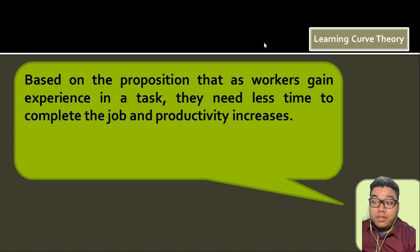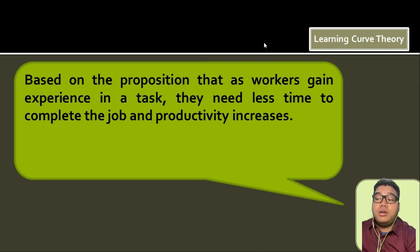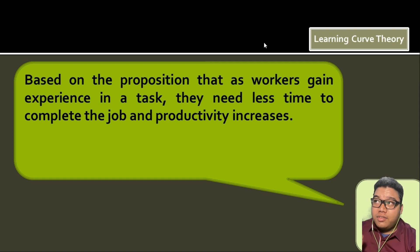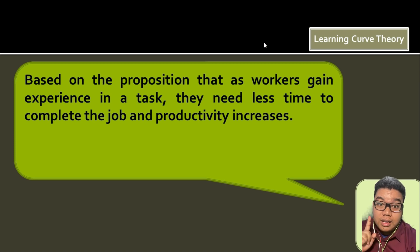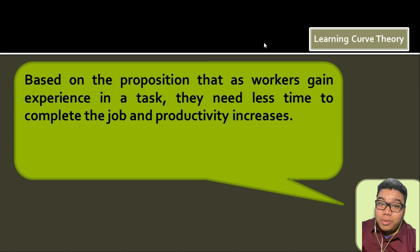Learning curve theory is based on the proposition that as workers gain experience in a task, they need less time to complete the job and productivity increases. For example, if it took one hour to finish a task the first time, the second time you would take fewer hours to complete it.